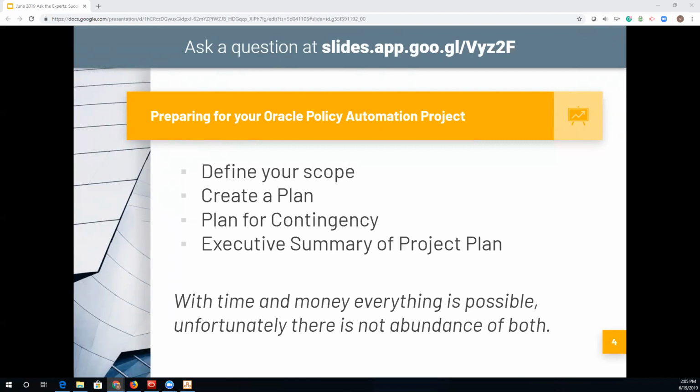There is an element of education that will come into play, and we would encourage you to plan for this accordingly. Pad your schedule, give yourself some extra time in order to have those contingencies planned for, and not have to come up to the end of your timeline and ask for more time, which isn't always the best outcome.